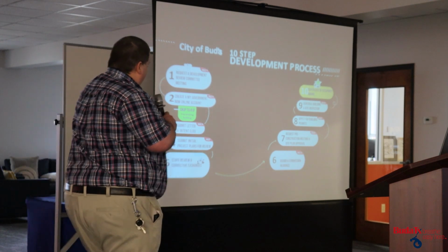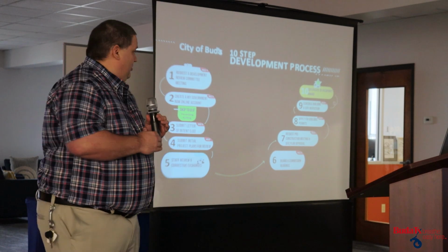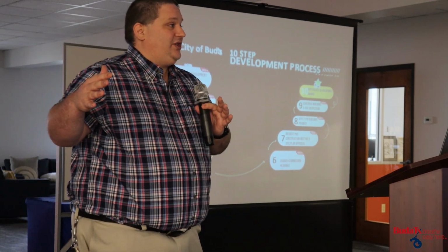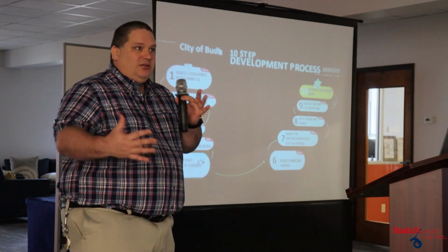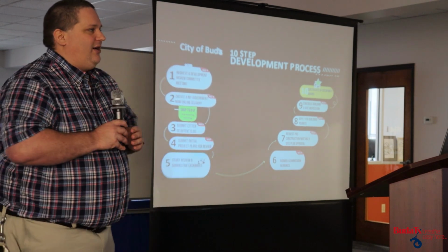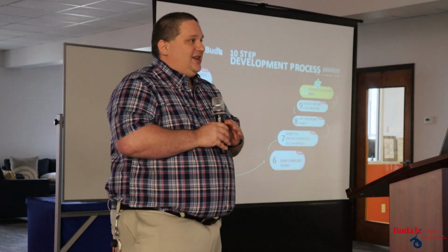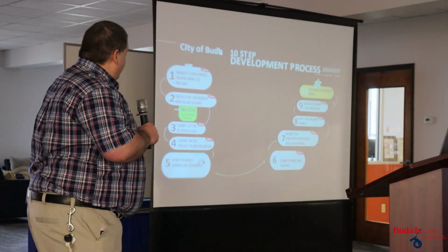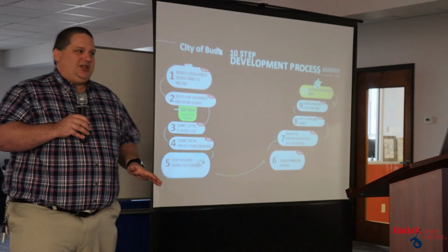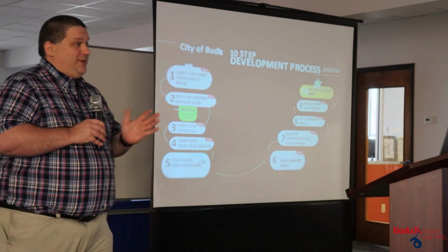Because what you're going to do, you're going to submit your plans, staff is going to review the plans, we're going to communicate with you. You might submit plans and we say, hey, these are great, let's move on to the commission. Or it might be, hey, we need a little work here, we need to work with your engineers on this, and we just do a little back and forth. And that review, depending on the project, can take a few months. But we're going to do a little back and forth and make sure that your project meets all city standards, and we've come up with a path forward that's going to be good for your business, good for the city.